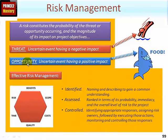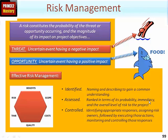Risks could impact any one or more of the six variables of any project. For risk management to be effective, risks need to be identified, assessed, and controlled. Identifying means naming and describing each risk so that everyone has a common understanding. Assessment covers probability, immediacy — referred to as proximity, meaning when from the present time the risk might occur — and the overall aggregated risk level to the project.